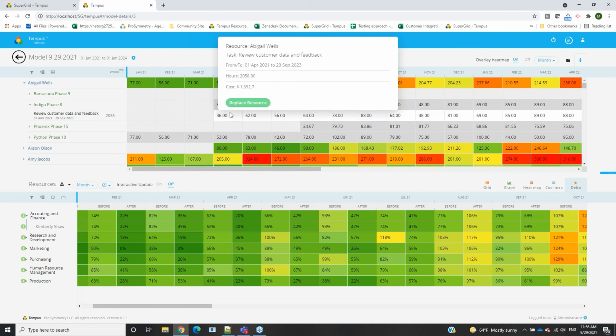It is inevitably up to the user and what they're ultimately trying to do. But my recommendation is that if a lot of replacement changes are happening, you may want to do those in the project and then see what that correlates to in the model, especially for proposed projects or new projects that have not been started yet.